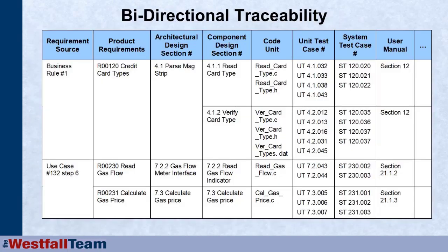So we've got that traceability matrix. This is just an example. A bi-directional traceability matrix is considered one of the configuration management tools. Now this one is by no means complete, but every product requirement should trace back to its source. Every product requirement should trace forward into all of the components that that configuration item or that requirement was built into. Now, this is not a complete one.